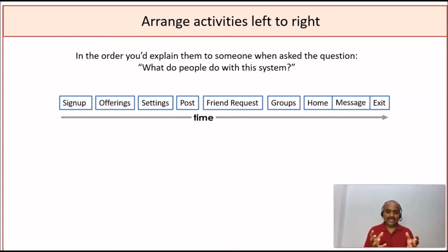So usually we invite the user champions who know the needs of the users, and we'll ask them, here are the set of features we are having, and what do you do with my system once you log on? So based on their journey, their story, we will actually formulate our walking skeleton. So here is how we group our product offerings. Okay, and this particular grouping is being done based on the user preferences. Remember, my friends, we are building this particular product roadmap planning event keeping user experience at heart.